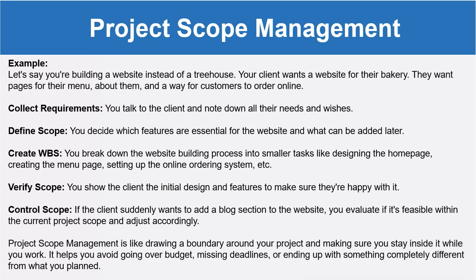For example, friends, say you are building a website instead of a tree house, and your client wants a website for their bakery. They want pages for menu and about them, and a way for customers to order online, take payments, etc. So first you will collect the requirements. That means you will sit with the client, have a meeting, and note down their needs, requirements, goals, objectives, and wish list.